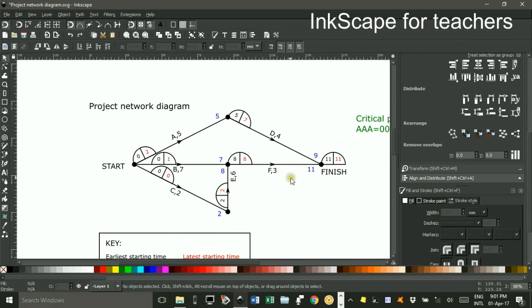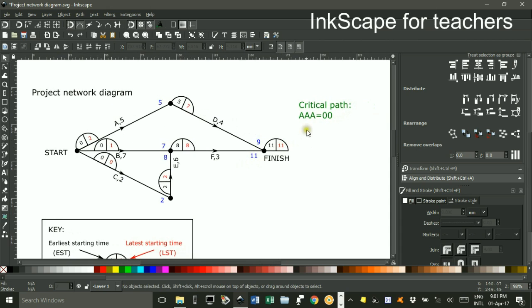So that completes the table. I'll just Ctrl and zoom to zoom out a little bit. I should write, the critical path is where the numbers are the same. 0, 0, 2, 2, 8, 8, 11, 11.